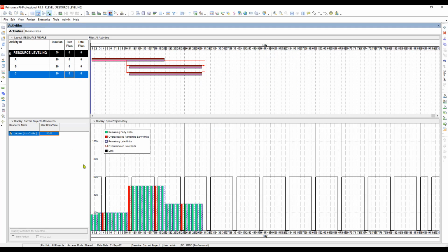So you can compress your project. Okay, you can finish the project in 50% of the duration, right? Now, if you look at the available resources here, the available resources can compress our project to 30 days, which is 50% of the duration of the project.